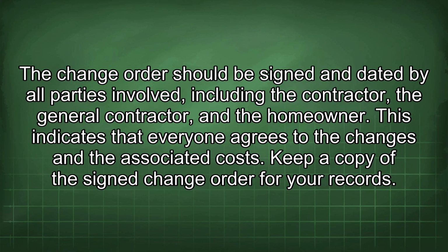The change order should be signed and dated by all parties involved, including the contractor, the general contractor, and the homeowner. This indicates that everyone agrees to the changes and the associated costs. Keep a copy of the signed change order for your records.